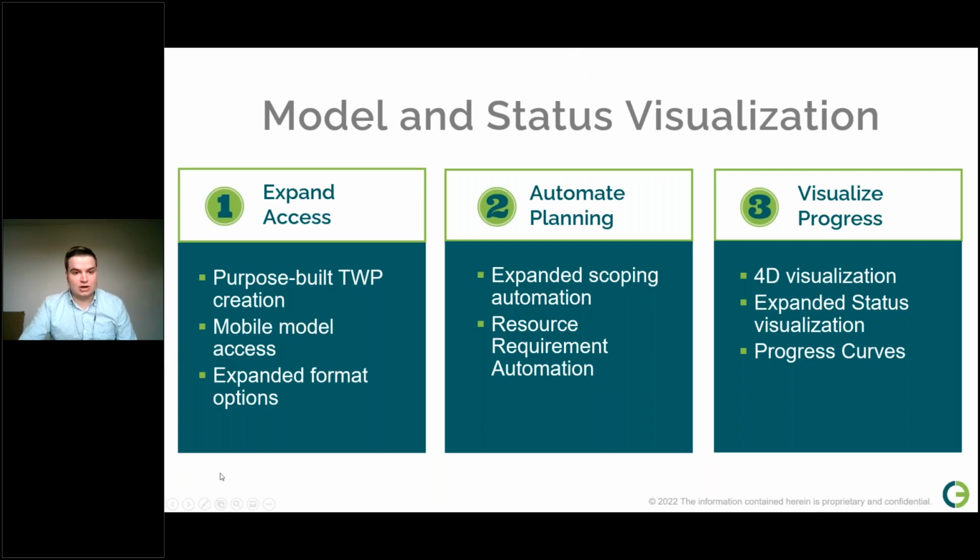Second, we expanded automation for planning based on this data, utilizing model data to automate some planning, estimation, and crew requirements. Finally, we expanded visualization of progress. Progress curves provide granular tracking of progress across entities. In the 3D model, there are additional options for readiness and progress, and 4D playback allows for the same information to be viewed over time.